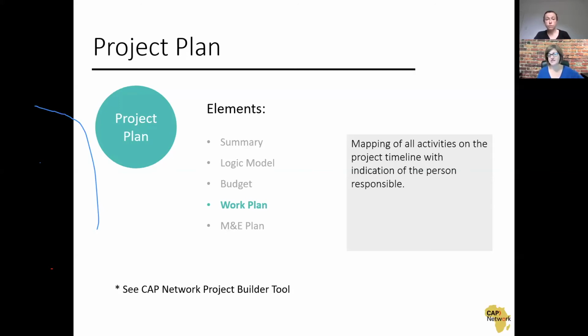So that's a good place to put notes as well, to explain, for example, fuel prices might be really, really high where you're living or where you're going to be implementing your project, that would cause the transportation line to be higher than a funder might otherwise expect. So you'd want to make sure that you're explaining that as well.